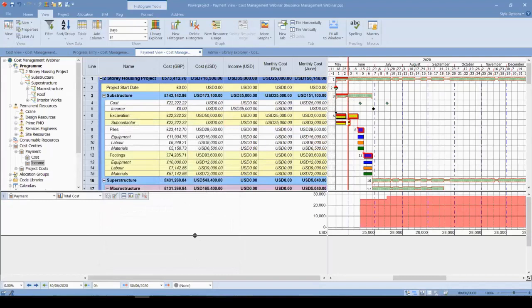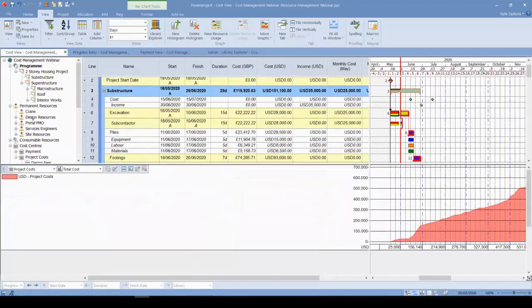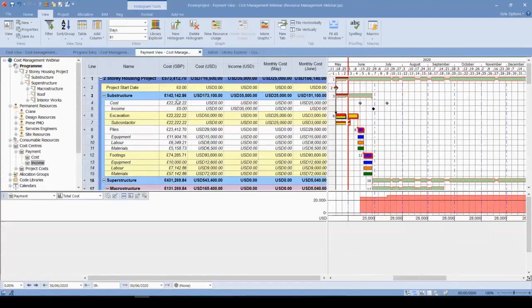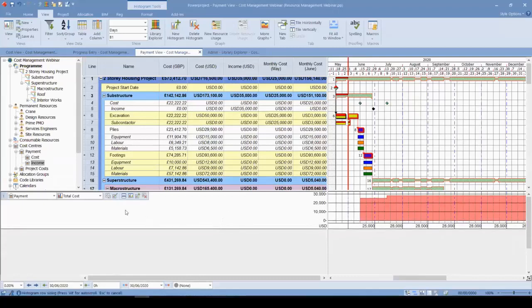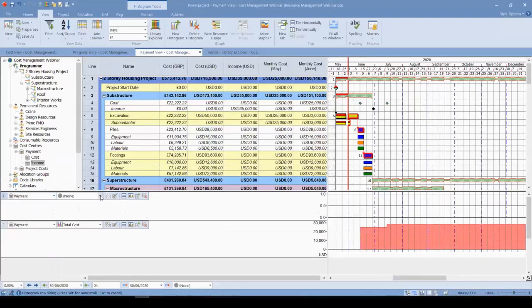So what this actually means is that until the end of June, I cannot receive any payment. But our earned value was showing that, you can see where our initial payment is located, but according to our schedule, we need to earn 156 US dollars. So this difference actually creates the cash flow problems. That is why we need to control this payment.